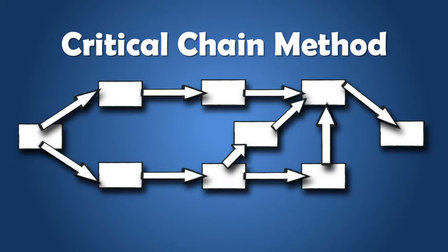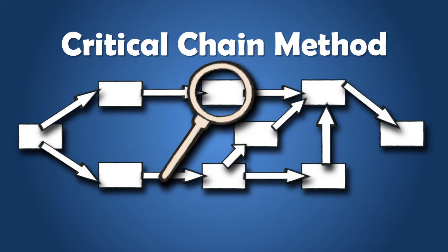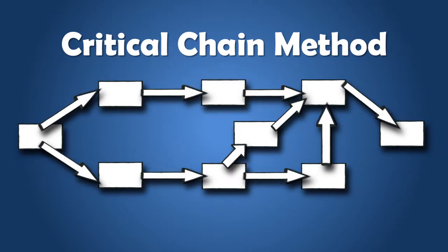The critical chain method is nearly identical to the critical path method, except that with the critical chain method, the activities are analyzed as aggressively as possible and a buffer is set aside for use in managing any slippage anywhere in the chain. Management within the organization is usually aware of the buffer. However, this information isn't usually divulged to the workers on the project. Sometimes it's not a good idea to let people know how much slack time they have on a project because, most times, they'll use it.